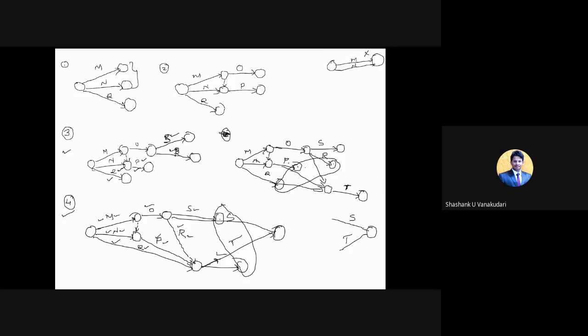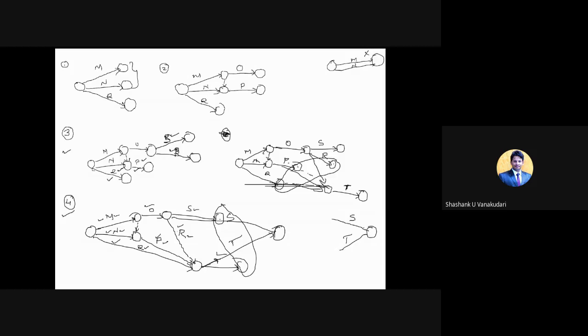Okay, so you might ask, sir, can we provide a dummy activity here and club this node from here to here? It's not possible. A dummy activity is only useful where it's not possible to rearrange the network diagram. Here it is very difficult to rearrange the network diagram, so we have provided this dummy activity at the second part.